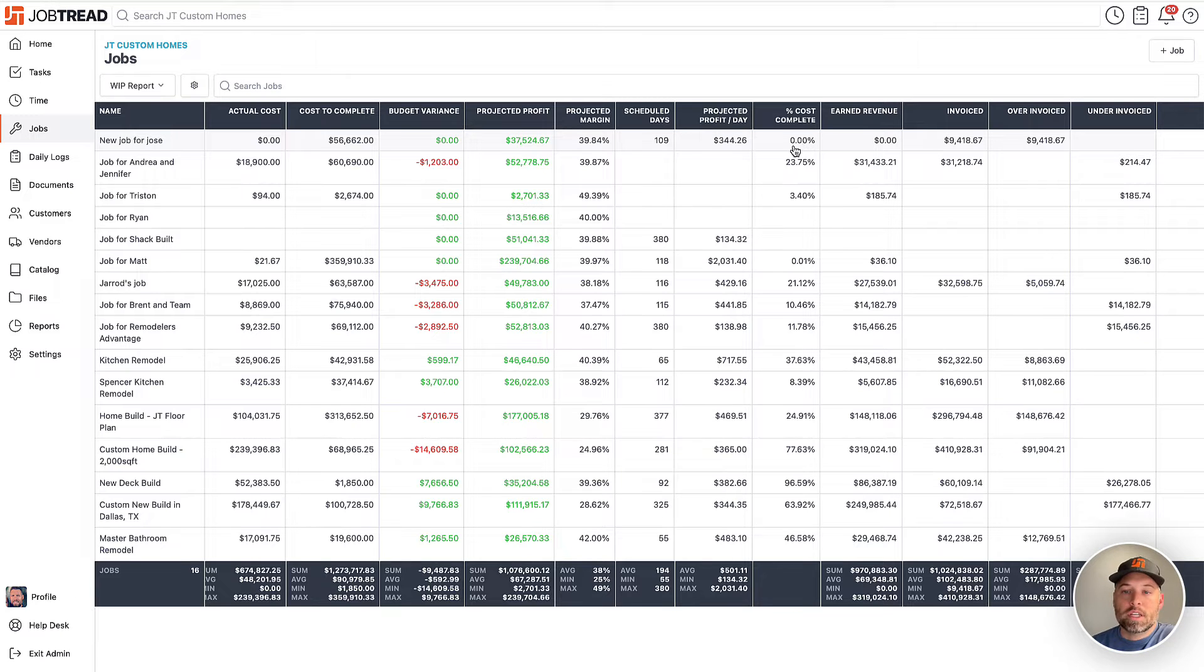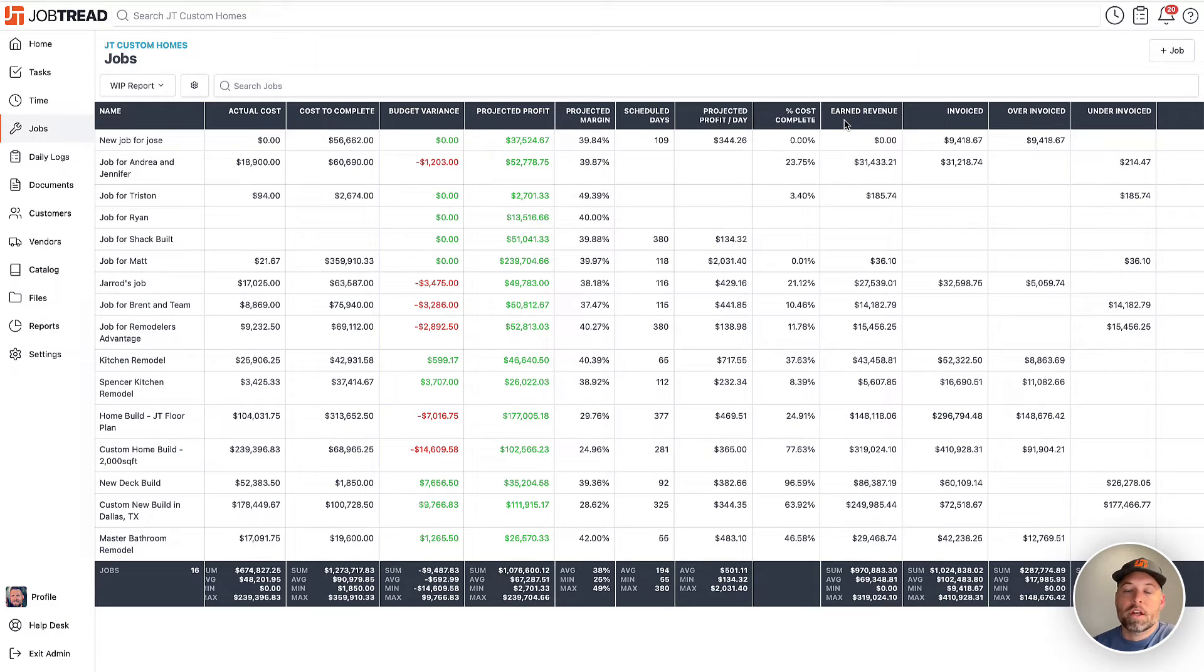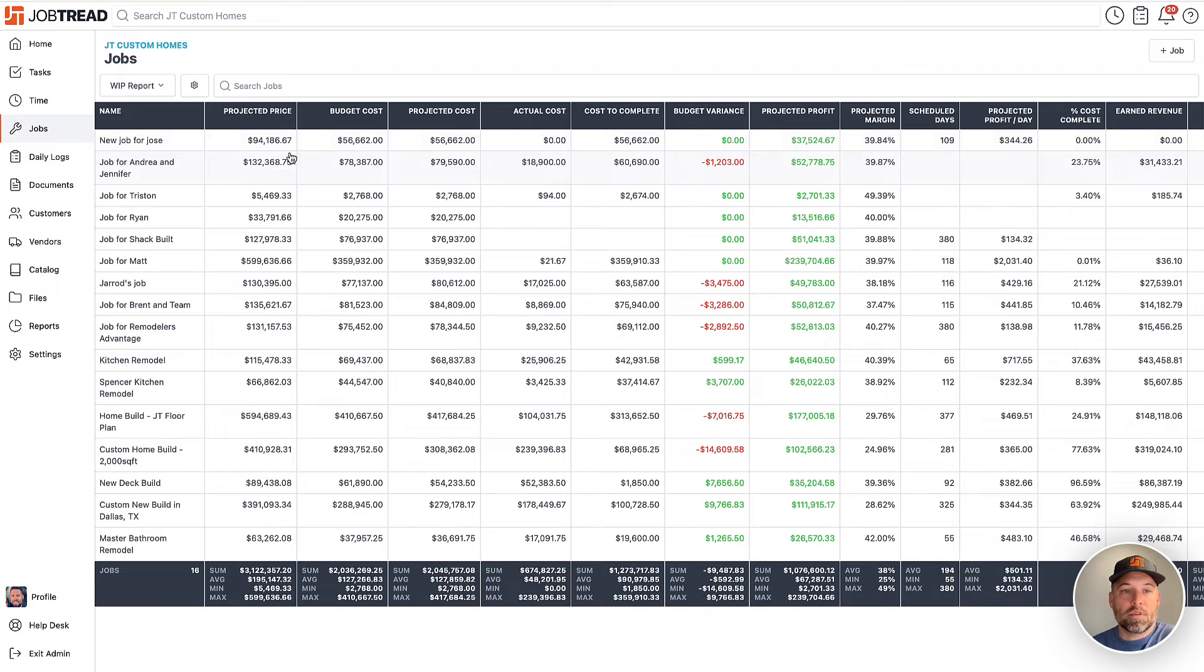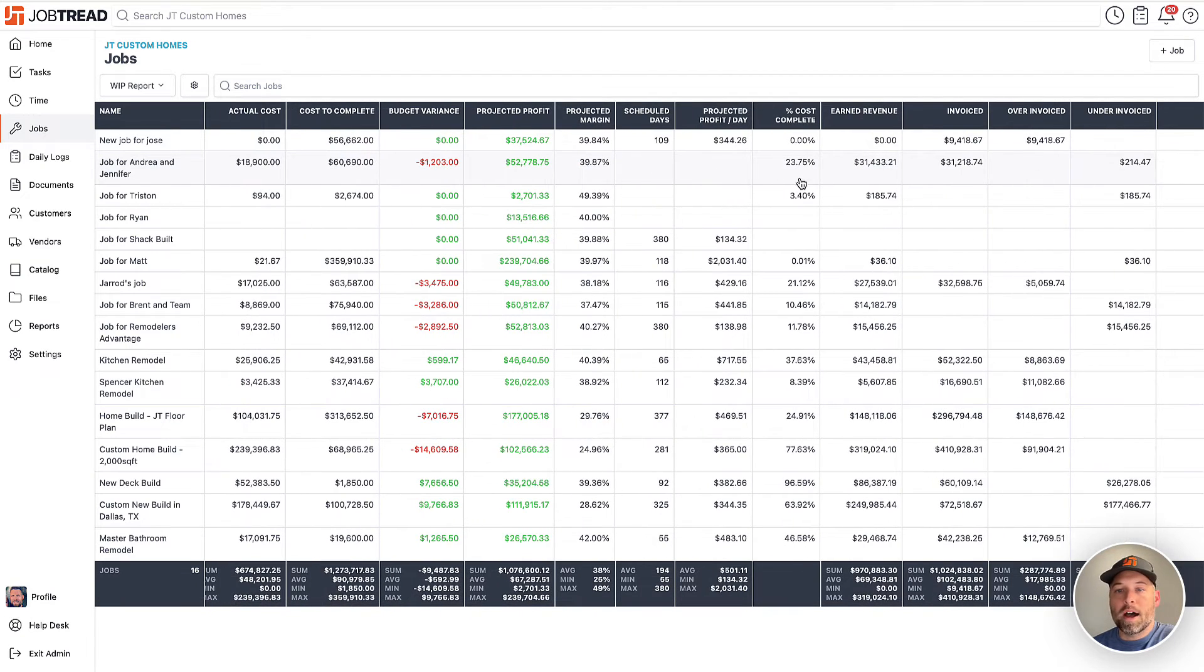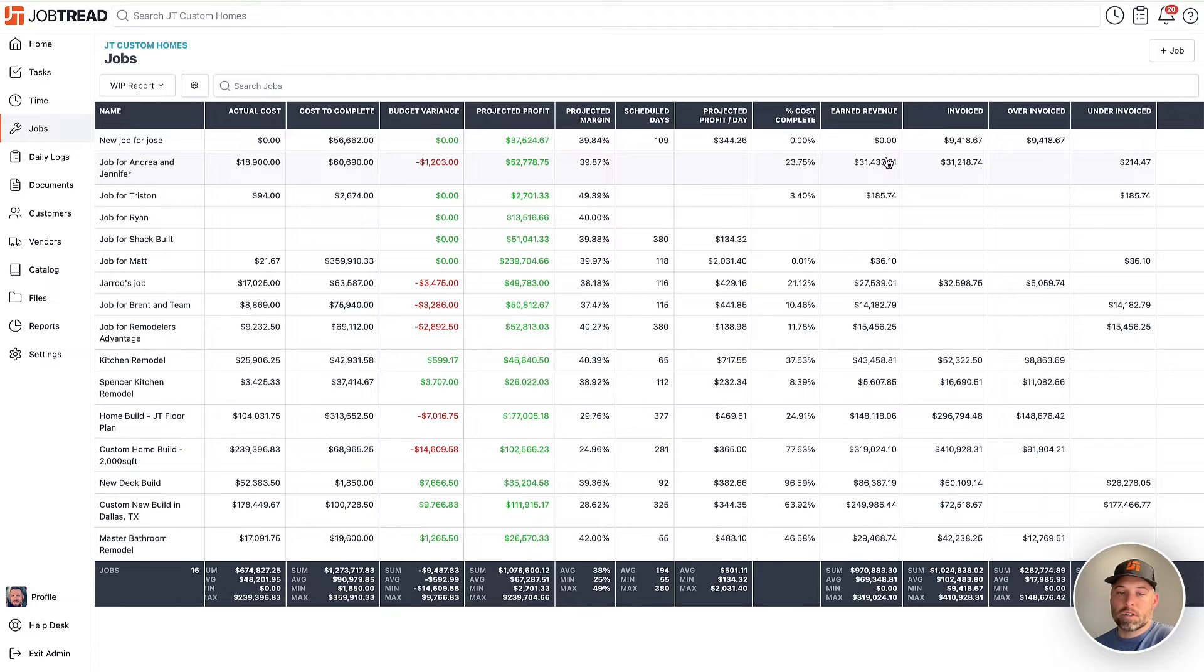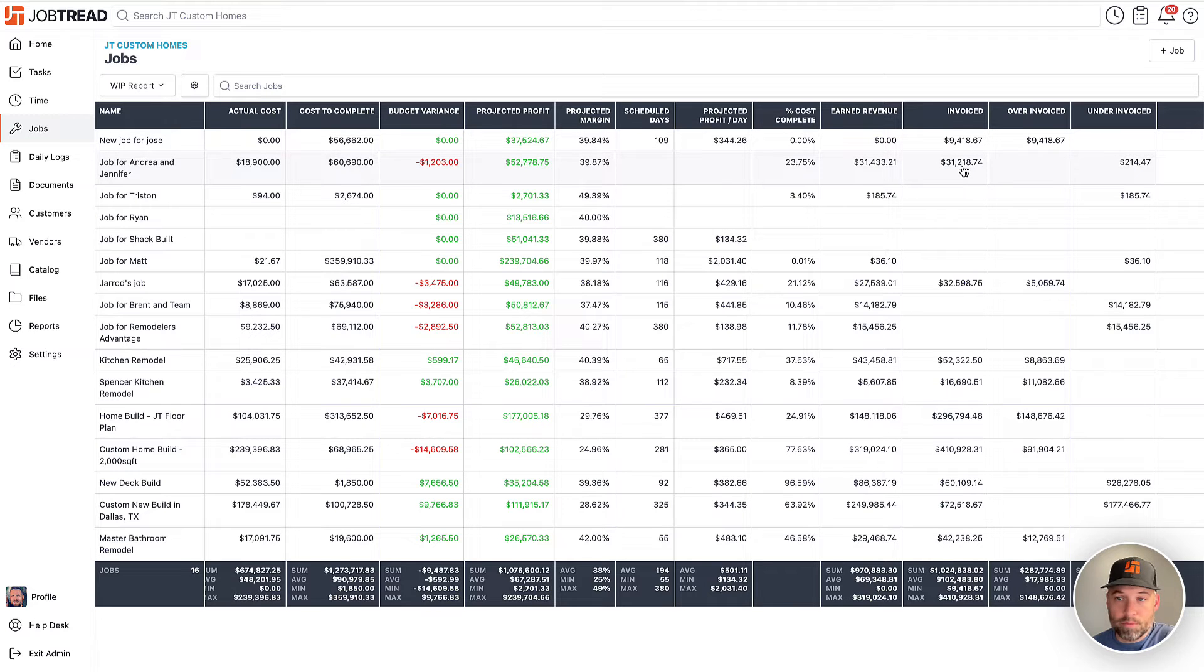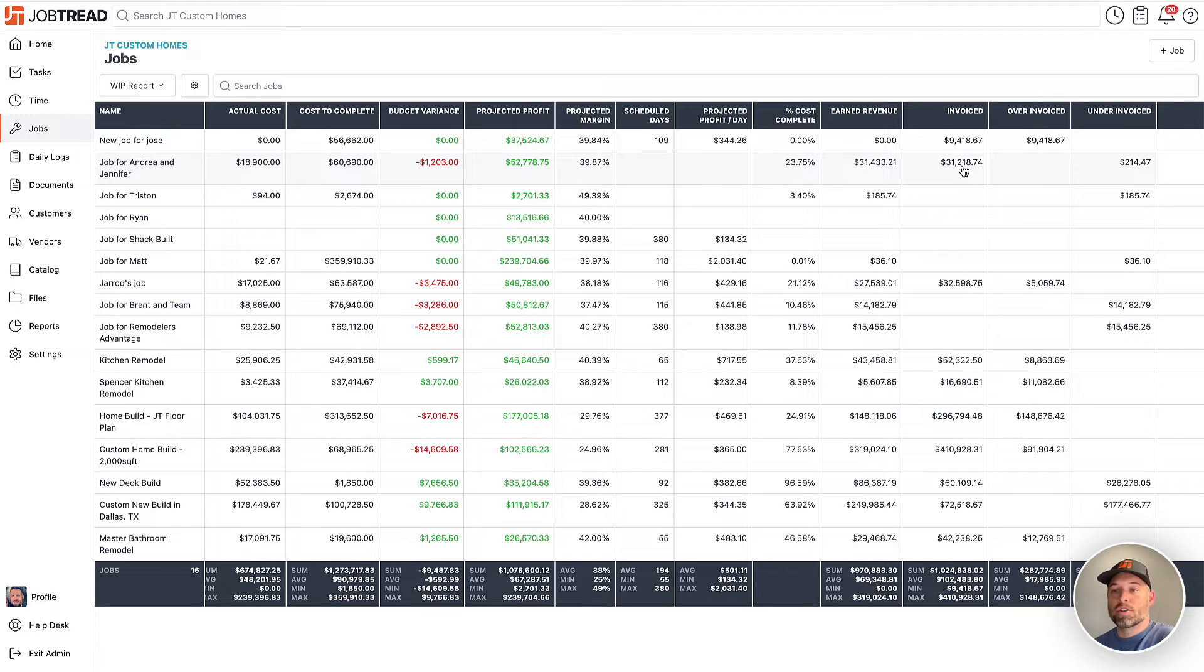So the reason this is significant is because it can help us realize earned revenue. So what this number is, is the actual projected price multiplied by the percentage complete. So that number right here is going to show you essentially what you should have invoiced for so far. And to the right of this, we will see that number: what have we invoiced for so far on the job? And from there, we can determine if we've over-invoiced or under-invoiced.